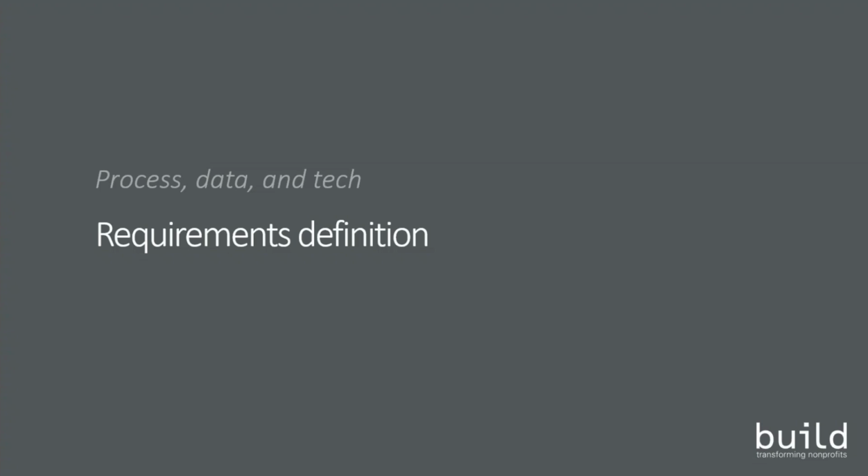over schedule. And so one of the reasons that Build Consulting prefers to get involved with client technology projects during the early assessment and roadmap phase is because when we first get involved at the implementation phase, it often becomes apparent that the organization needs to back up and do the requirements definition in a deeper, more thorough manner before it can have a successful implementation. And when a vendor is engaged and the implementation is already moving, it can be really difficult and costly for the organization to push the pause button and back up and do different requirements, especially since that could lead to the decision to go with a different implementation partner or a different software solution.